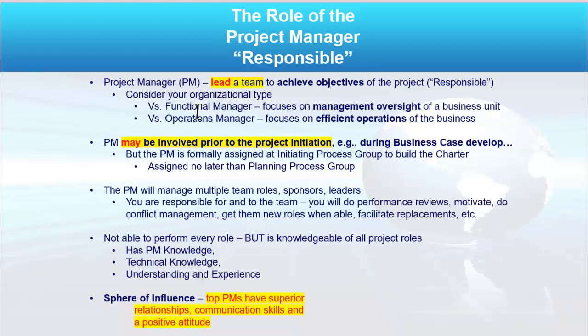So you may be involved at the project initiation. We hope so. We hope that the C-suite, the leadership of the company, the CEO, the COO, hand you those business documents and the benefits management plan, the benefits they expect to get from the project. And then you will start to build your project charter, which is going to help you then develop your project plan, right, in this progressive elaboration, as you get more detailed over time as you clarify the direction you're going. So you want to be involved early.